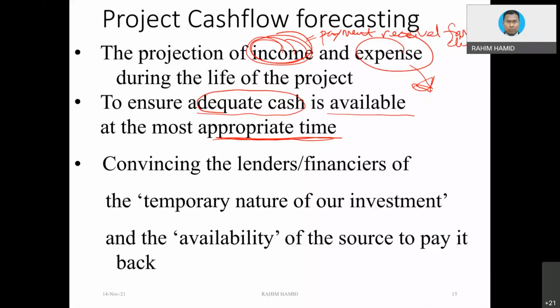So when you think about the timing of the project activities, that is fine, because you want to let people know when you are going to start a certain activity and when it is going to end. At the same time, when you attach the cost, it gives you very good information about your cash flow. Even though you might not have started the project yet, you already know your cash flow. That is what we call forecasting. When you already know your cash flow, meaning how much money you have and how much money you need to pay people,